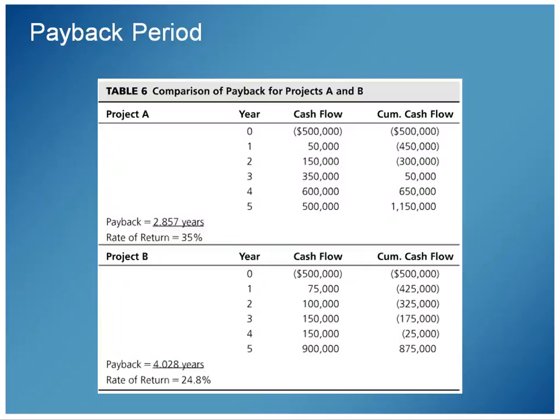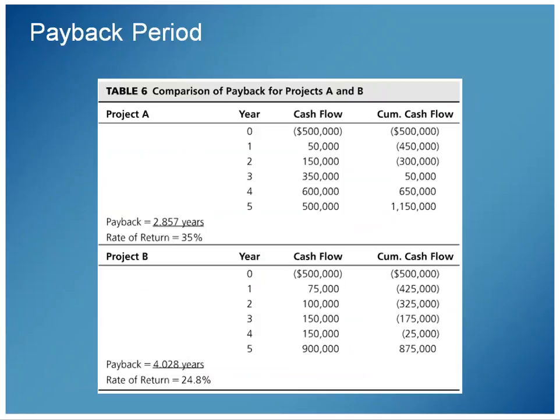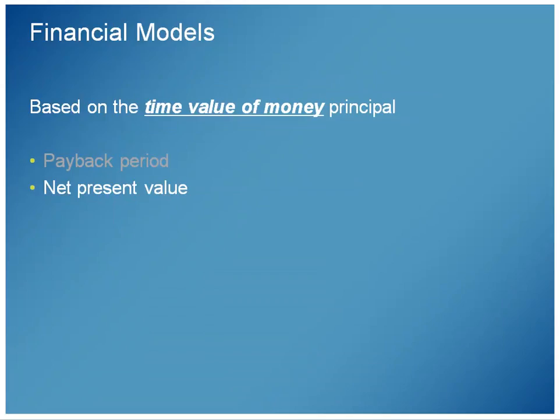And if it's a simple payback, like we had on this previous slide, a simple payback is easy to calculate. And if I gave you anything on a quiz, it would be a simple payback like this: the one-time investment divided by the annual savings. But you can do complex payback periods as well.